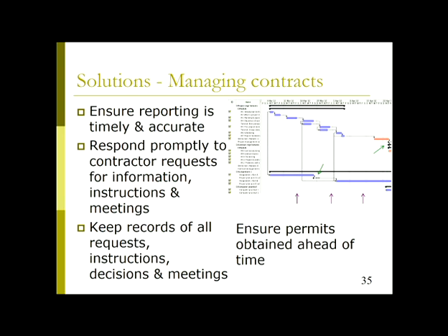Now, to some extent, if you report at regular intervals, then you haven't completed that piece of work and more time passes before the next report, and that's after that piece of work. So you could argue it would be better to report on the milestone rather than at regular intervals that actually are too early and too late for that completion of that piece of work. So that's a decision you guys have to make about your projects. But very often, if milestones are close enough together, it's better to use the milestones than regular intervals.